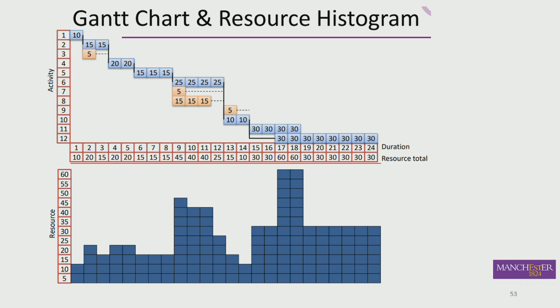And the point is with petrochemical that as soon as you shut down the plant, they stop making profit. So the race is on to inspect and maintain the plant in that 2-week period to the biggest effect, and then be able to start up again. As soon as you start up, they start making barrels of oil if it's the refinery. They start making medication again if it's for the pharmaceutical industry. They start to make profit. And they have to have this 2-week shutdown for regulatory purposes. Also, if they didn't maintain the plant, they could be shut down for months if something really broke.